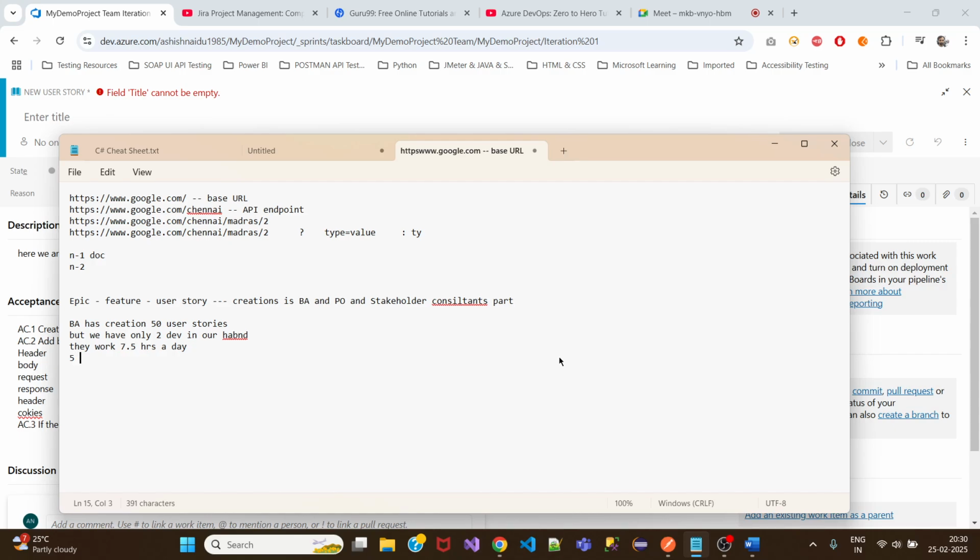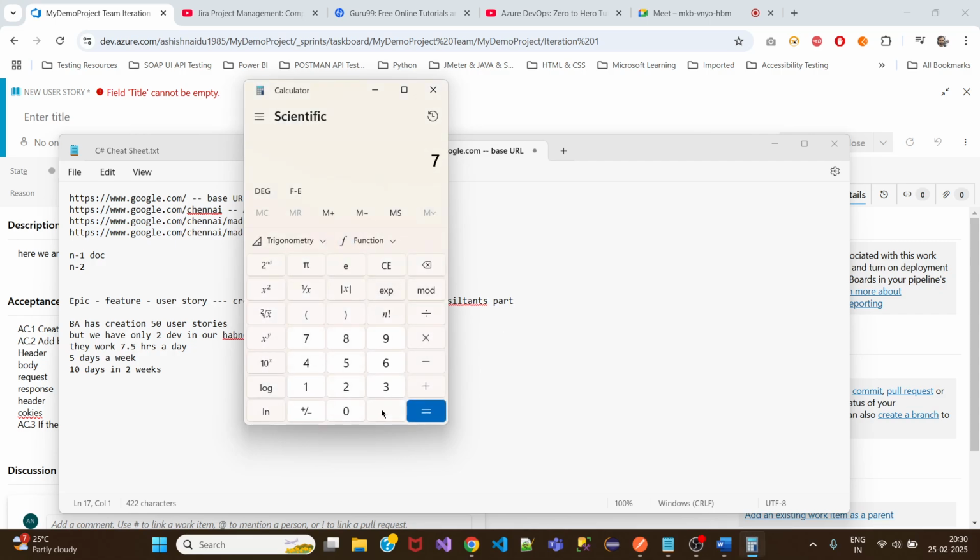If we say 5 days a week, then it will be 10 days in 2 weeks. So let's say 7.5 into 7.5 into 10, that is 75.